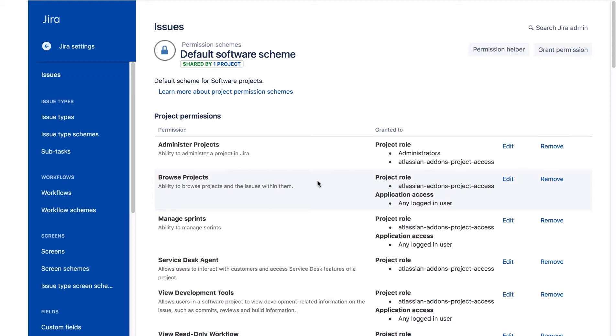Now we need to set up the permissions for the Planet app project, so only the development group members can create issues. We could do that by editing the default software scheme, but any changes we make to this default scheme will be shared with all new software projects that are created. In this case, it's a change that will only apply to this one project, or a small number of all software projects. So we'll make a copy of the default scheme and edit the copy.